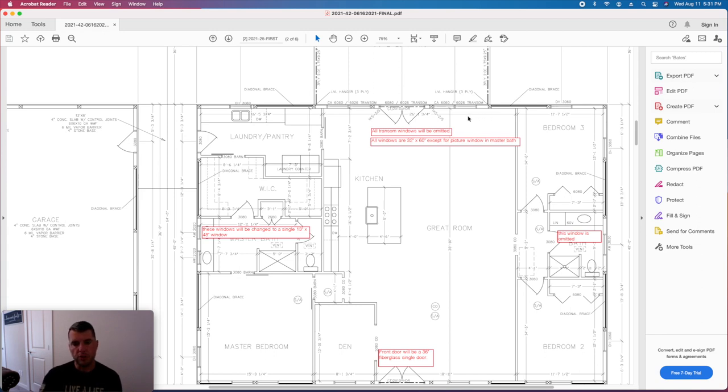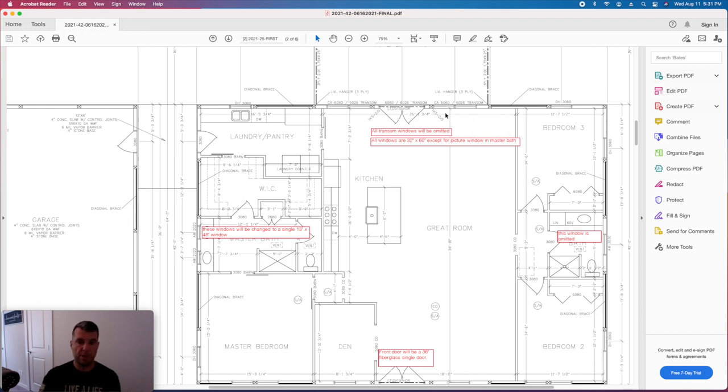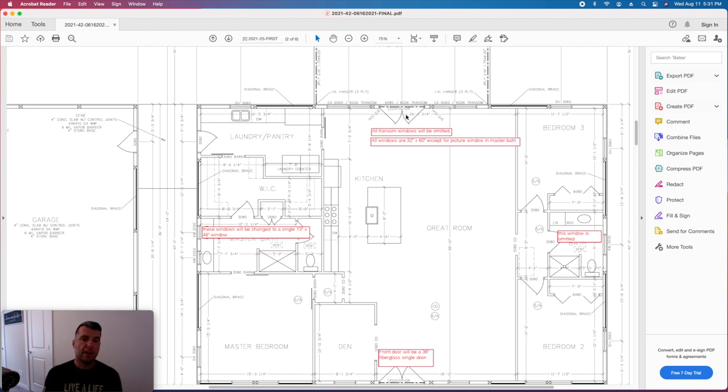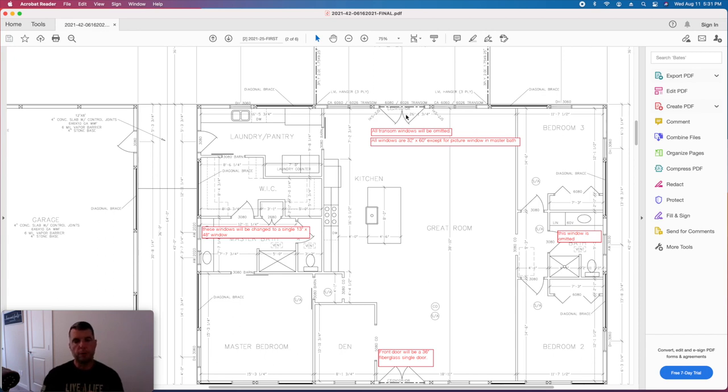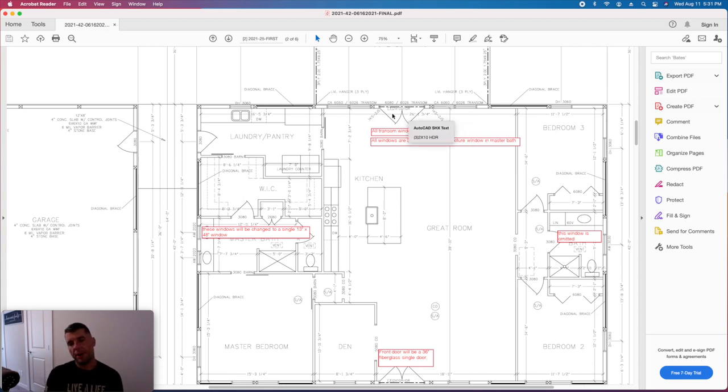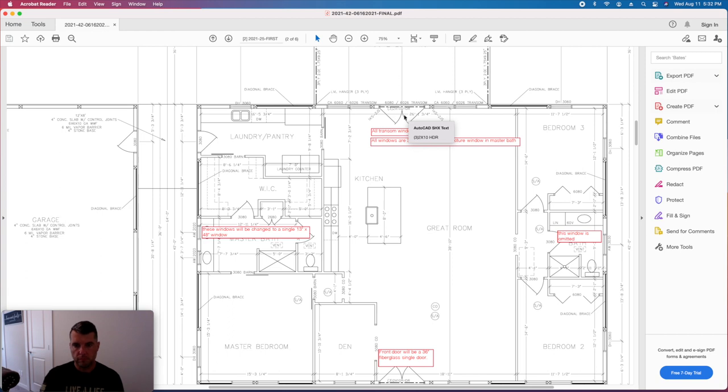So the other change that we had or that we're going to do to save a little bit of money is not do the transom windows on top of the windows and door. That's going to save us probably, I'm going to say, a couple thousand dollars after looking at the initial estimate from Lowe's. So we're going to eliminate those, and I feel like a five-foot window is still plenty big for us. It's still going to let in a lot of light, and it's still going to give us some great views.